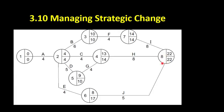To calculate the total float on an activity, let's have a look at the total float time on activity E, which is not in the critical path. The earliest that we could start activity E — we look at the earliest start time, it's week four in this node here. The latest it could finish is week 17 and it only takes four weeks to do. So to work out the latest possible time that we could start: 17 minus four equals 13. So we have to start this activity E by week 13 at the latest, but we could start it as early as week four.